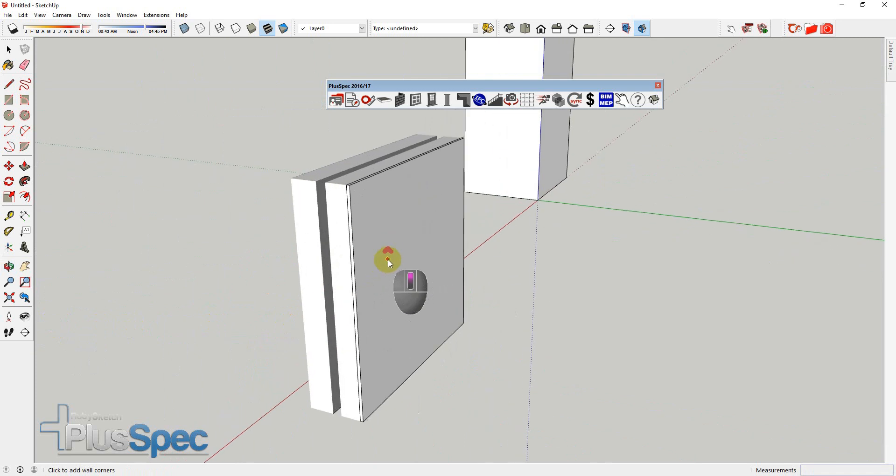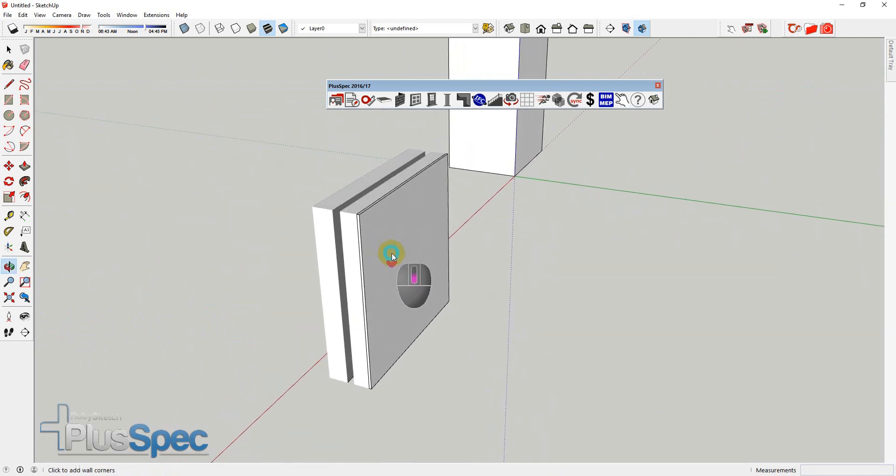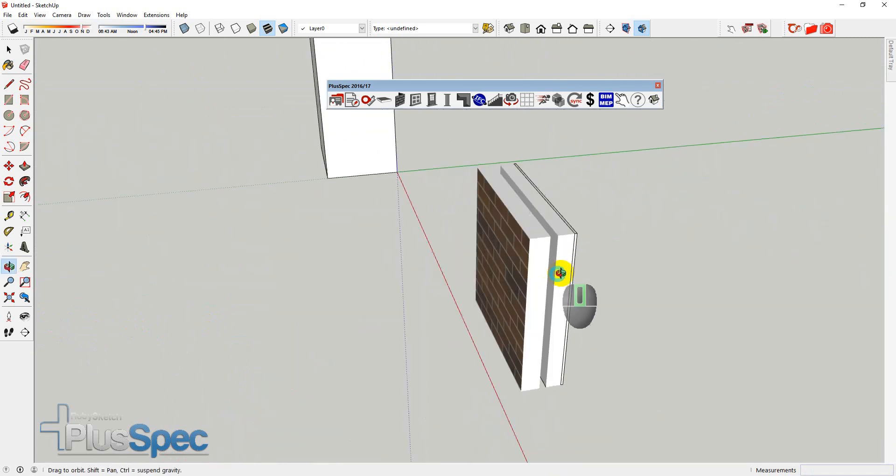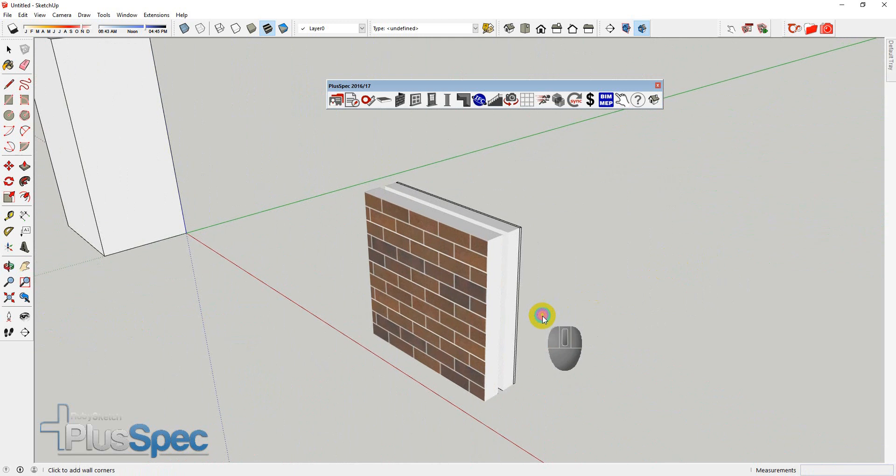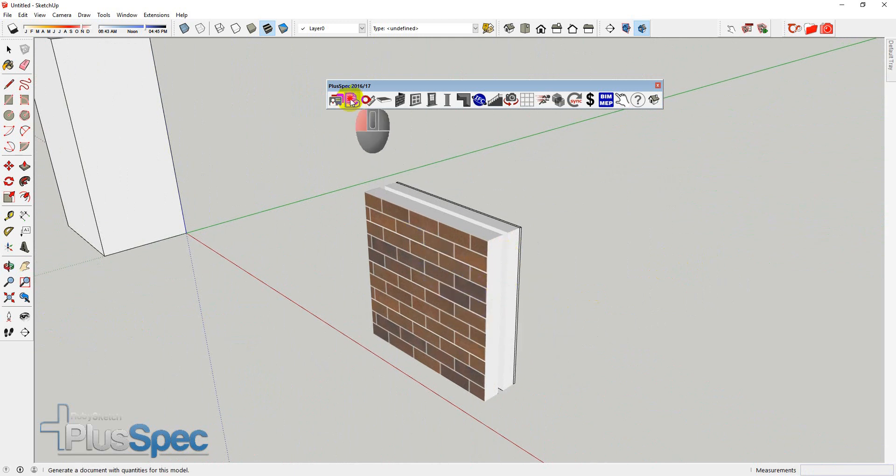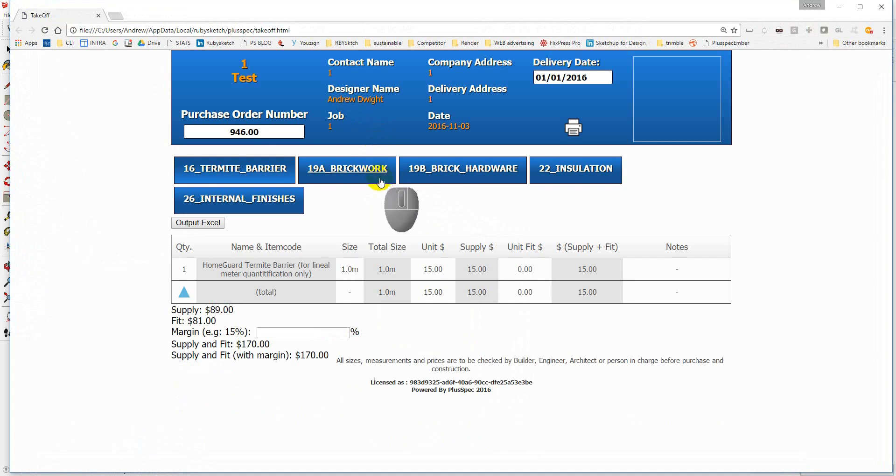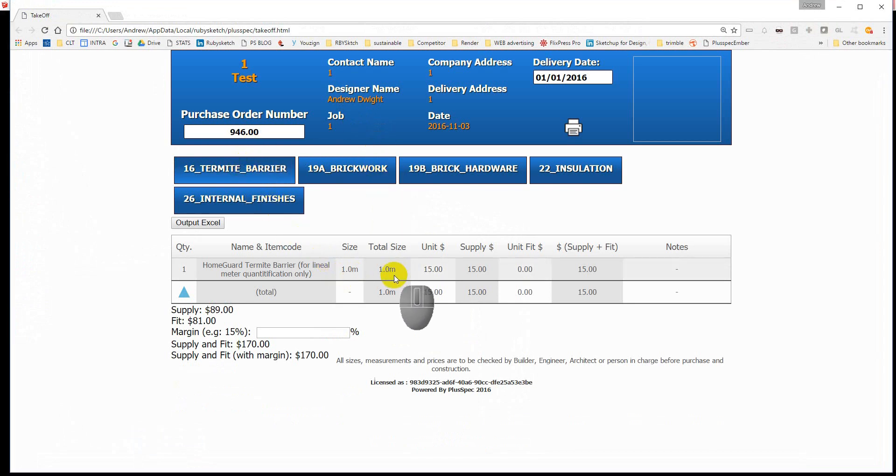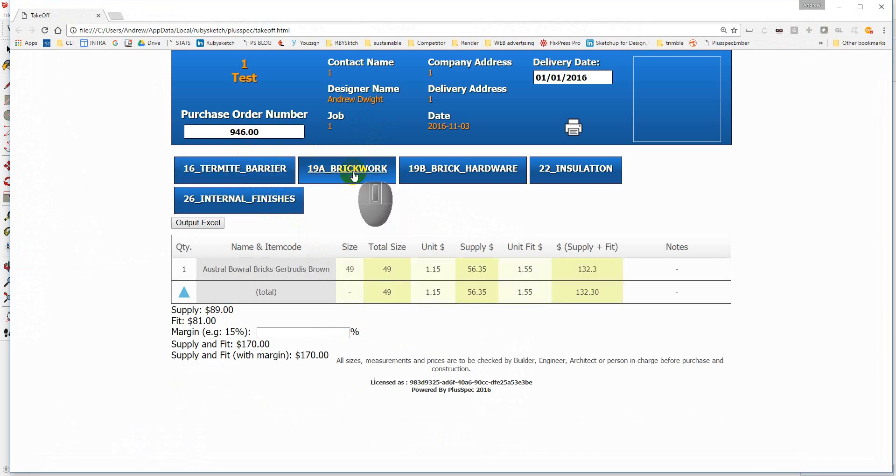Obviously, I'm going to have one square meter of wall. I should have one square meter of gyprock and everything else that's associated with a wall. It looks as though we've just got two faces there. However, we've got a lot more. I'm going to do a takeoff from this model now. Okay, so I'm going to go to my termite barrier, which is one lineal meter of termite barrier. And the supply and fit prices can be added in, and I'll show you how to do that shortly.